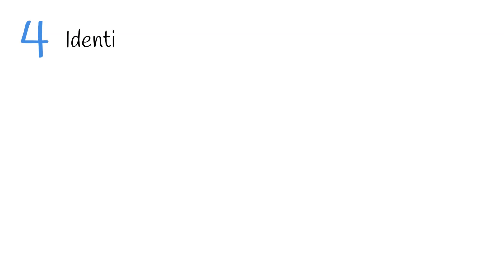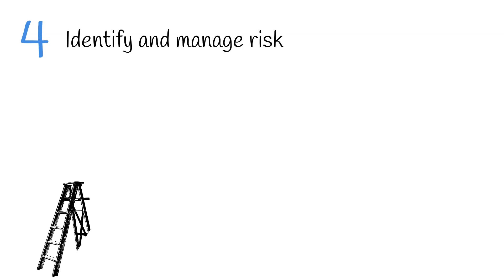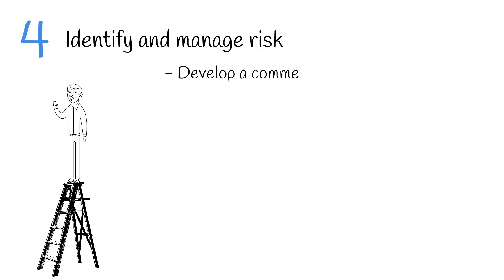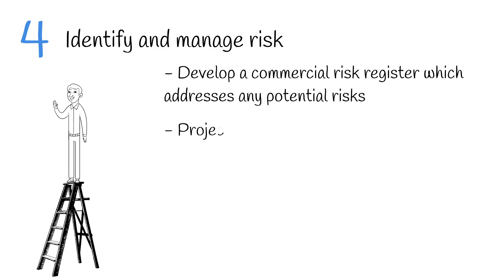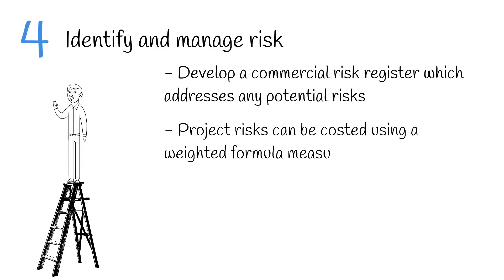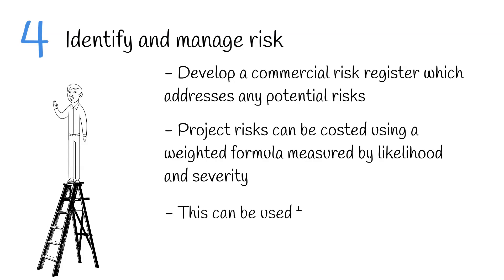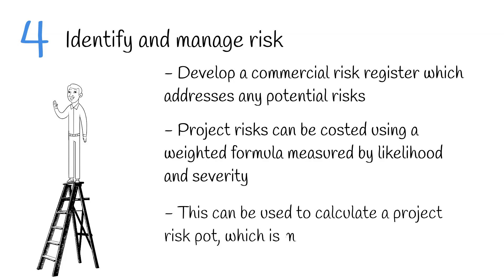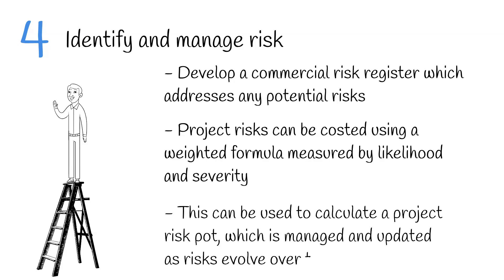The fourth tip is to identify and manage risk. Risk can impact the project budget and it's important to identify and manage them proactively. You'll need to develop a commercial risk register which addresses any potential risks. Project risks can be costed using a weighted formula measured by likelihood and severity. This can then be used to calculate a project risk pot which can be managed and updated as risks evolve over the project life cycle.